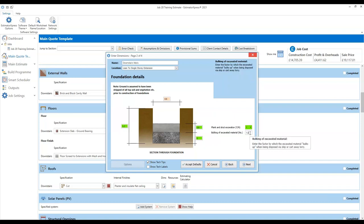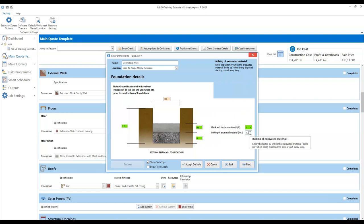There's a box called Show Tech Tips at the bottom. If you tick that, whenever you click into one of your input boxes, it will explain what the input box is looking for. In this case it explains the bulking factor — it tells you how much the excavated material will bulk up by. So it's telling us it will take 50% more space when being disposed of via skip, tipper, or redistributed around site. A bulking factor of 1.5 means it will take up 50% more space — that's a pretty standard industry figure. You shouldn't need to change it, but just so you know what it means.